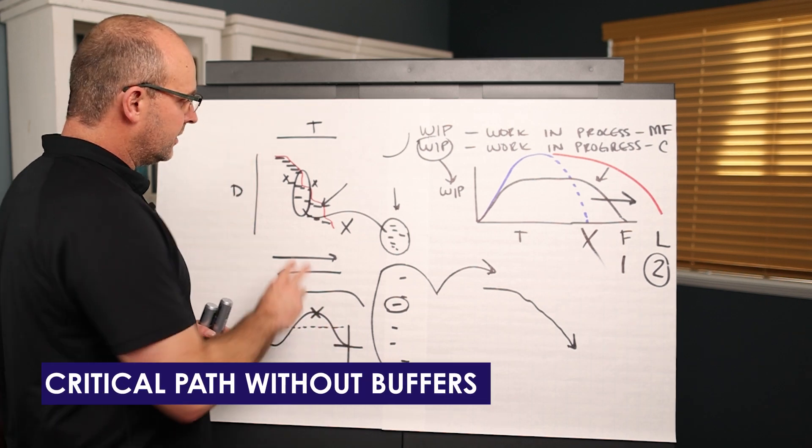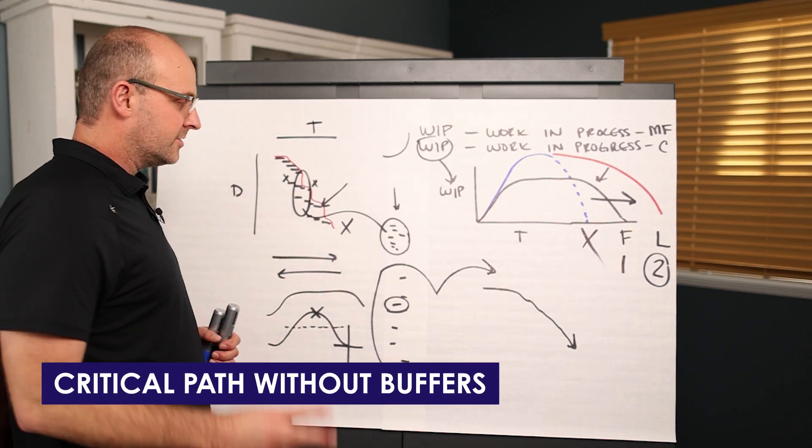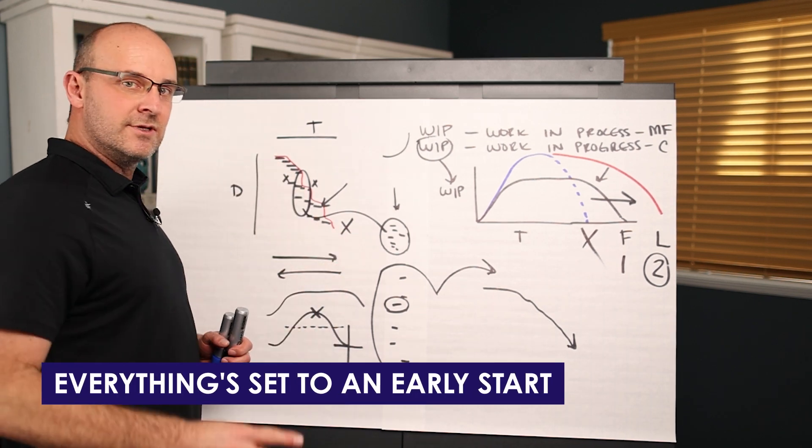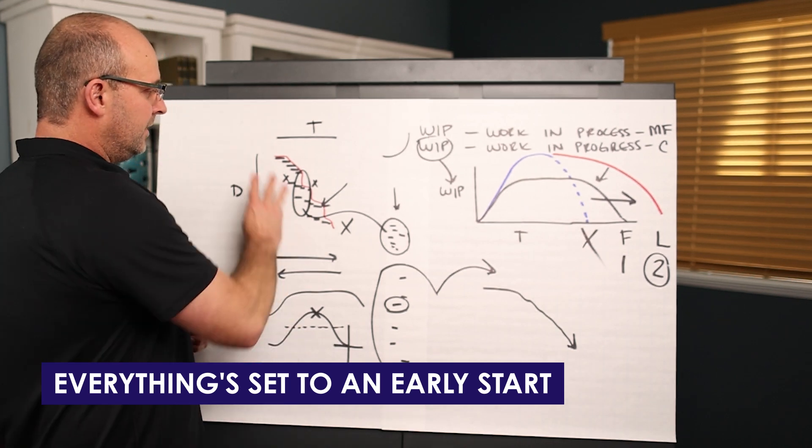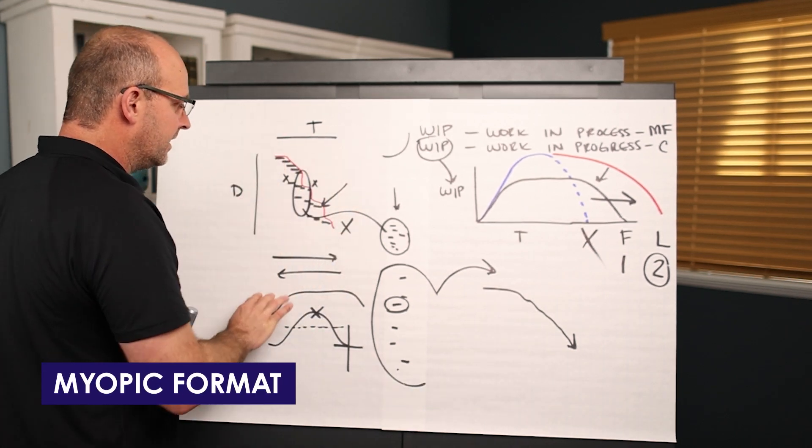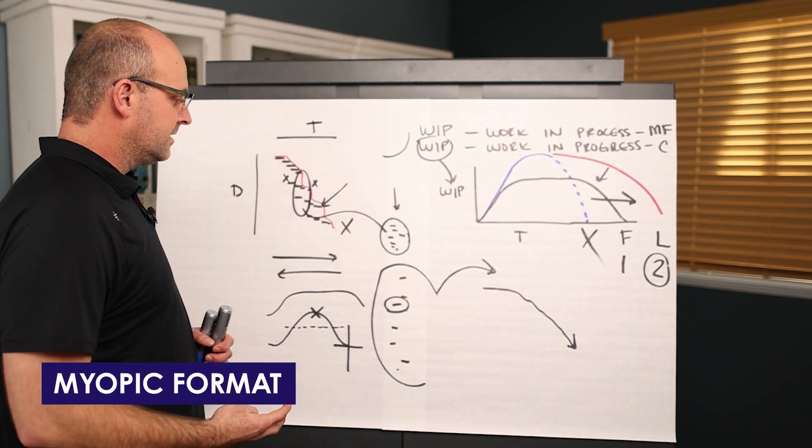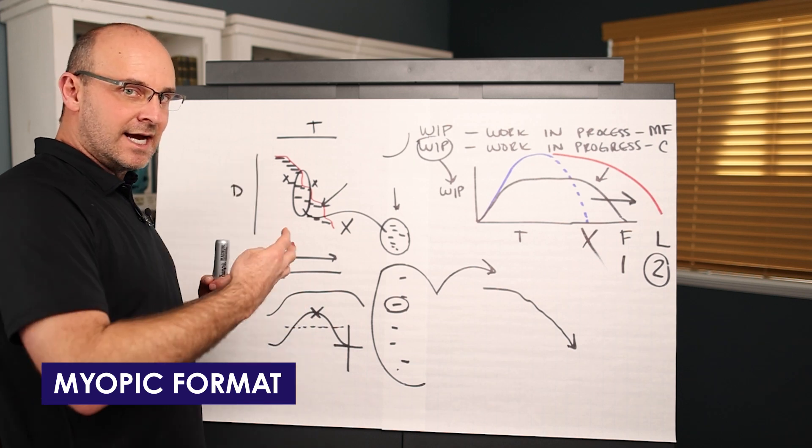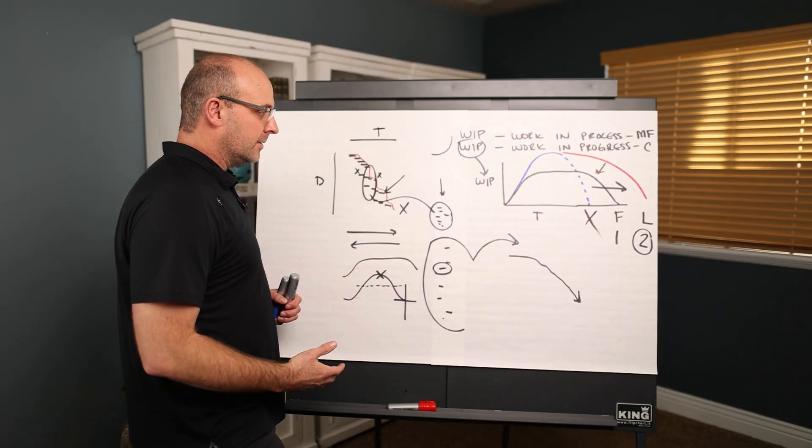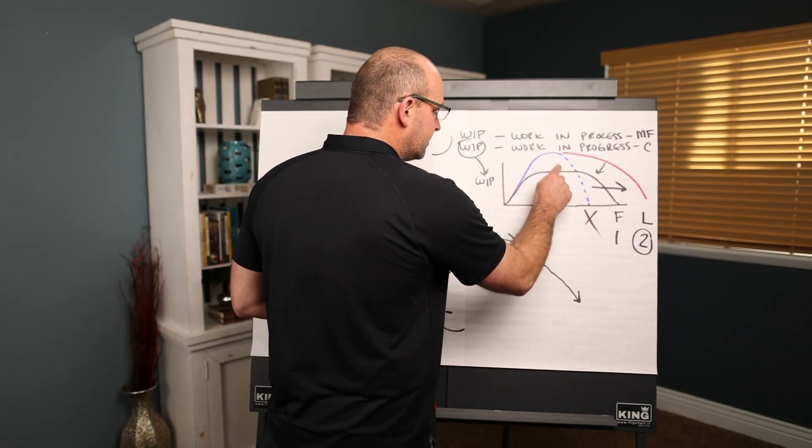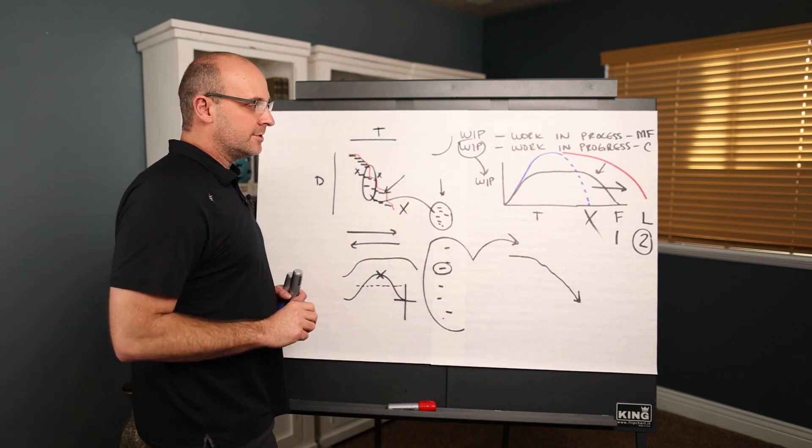Because you have a critical path without buffers, it increases WIP. Because everything's set to an early start, it increases WIP. Because it's in a myopic format with large batch areas that aren't properly zoned, it's pushing and stacking people. And so it increases WIP. It is designed to do this in the effort to rush and push and panic.